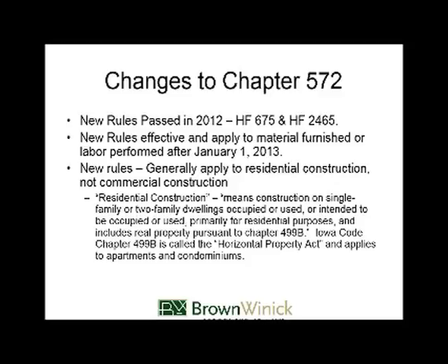And we looked into it, and we talked to a number of lawyers in Utah and talked to a number of people who were using the system and heard of a number of problems with it. So the recommendation that came from the Construction Law Committee was that we shouldn't pass these new laws. Well, as you can see, our weight doesn't carry very much, and the laws passed and they came into being. And these new laws apply to any labor performed or materials furnished to a site after January 1st, 2013.